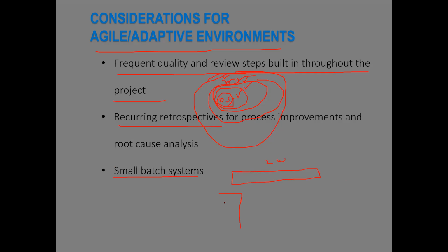Out of the product backlog, we only take one item at a time, or maybe two maximum. We work on that until it is completed. We really don't pick the other item. So small batch system. All these are agile ways of working, agile mindset that help us to assure the quality on the project. And that was end of today's session.